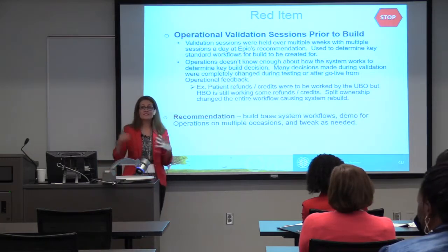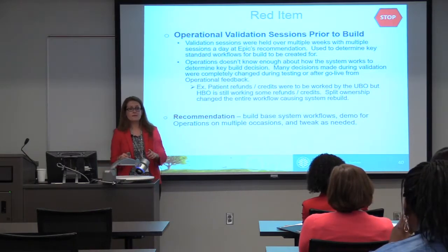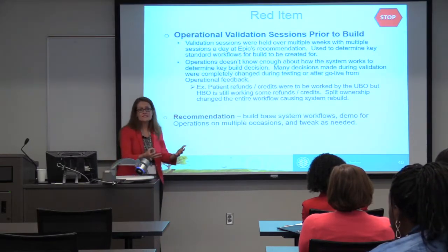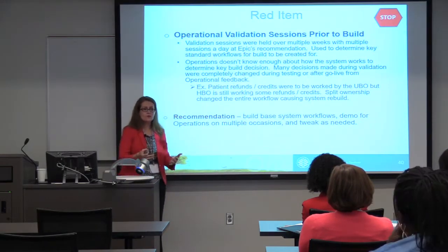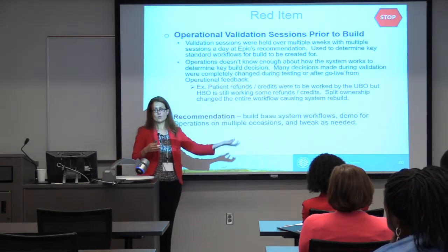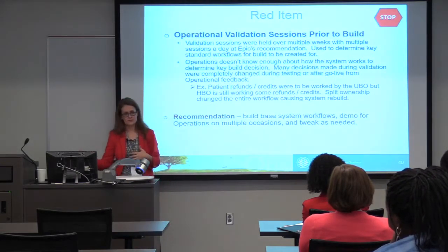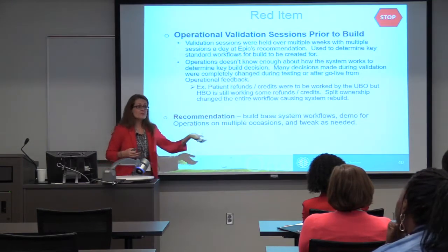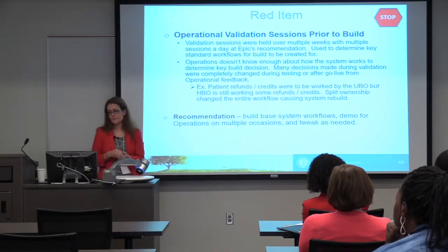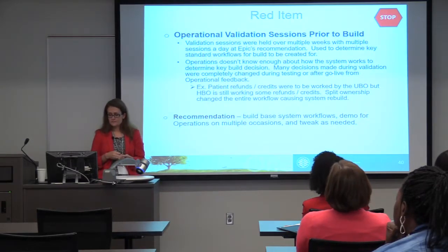And so we made a lot of decisions at that point that when we got to integration testing and when we went live, and even still today as we roll out, they're backtracking on their decisions that they made because, number one, they've never even seen the system. They don't know how it works. They're making decisions on how their legacy system worked and not knowing how this new system's going to work. And that may have been how we needed to do it then, but that's not how we need to do it now.